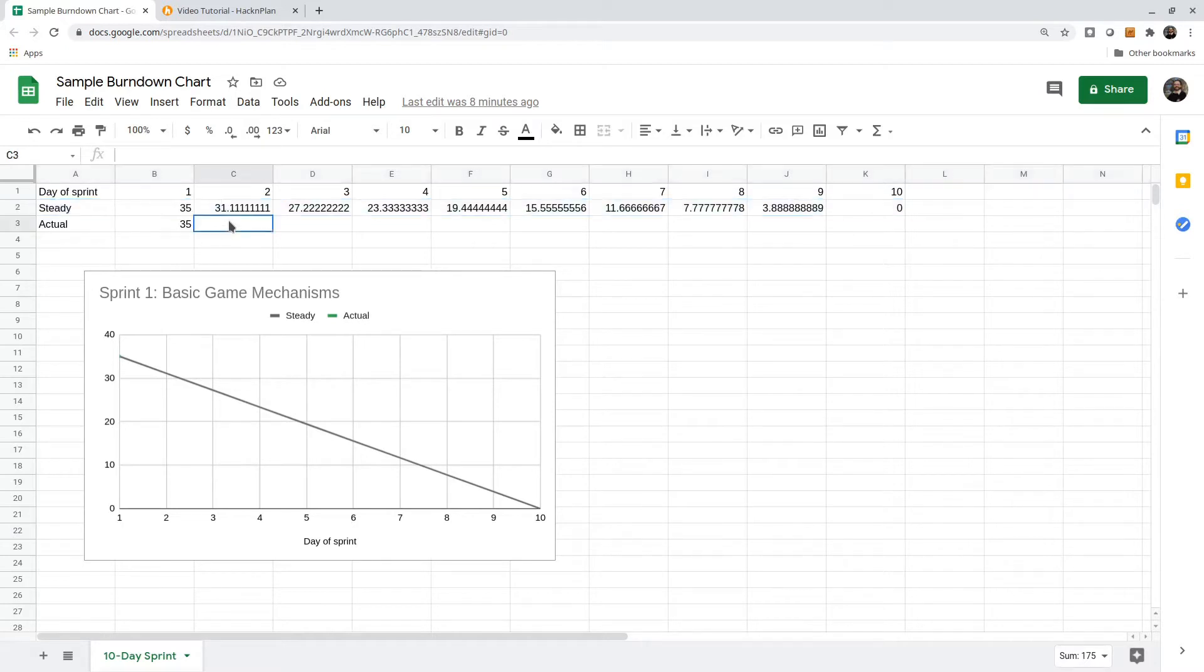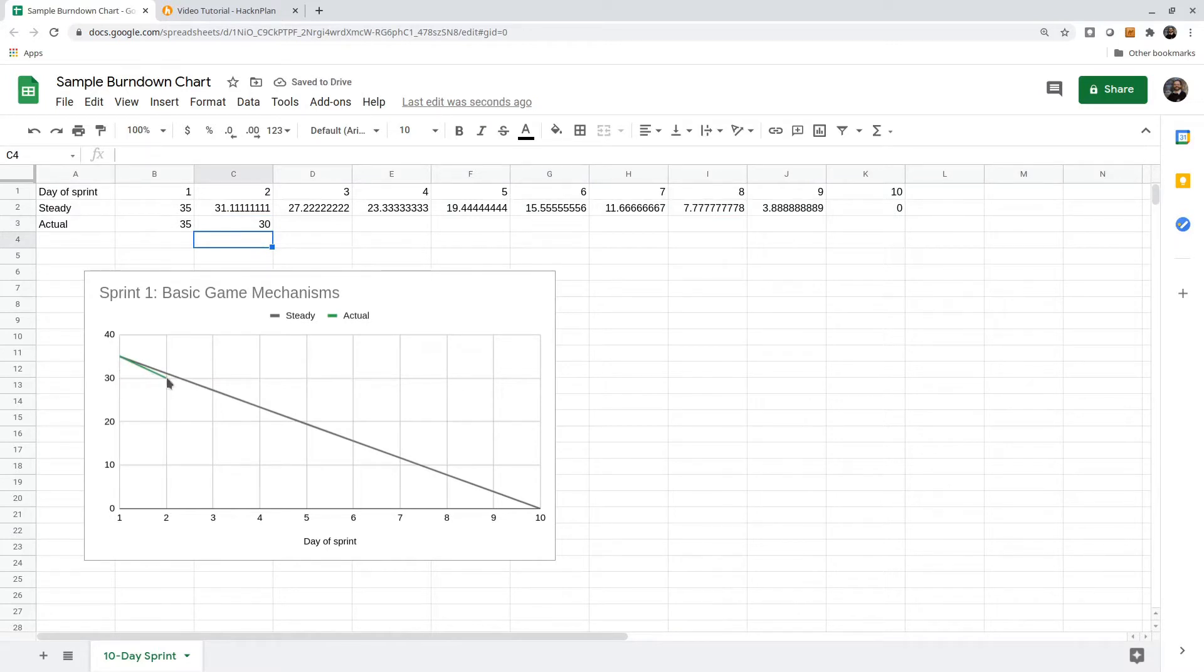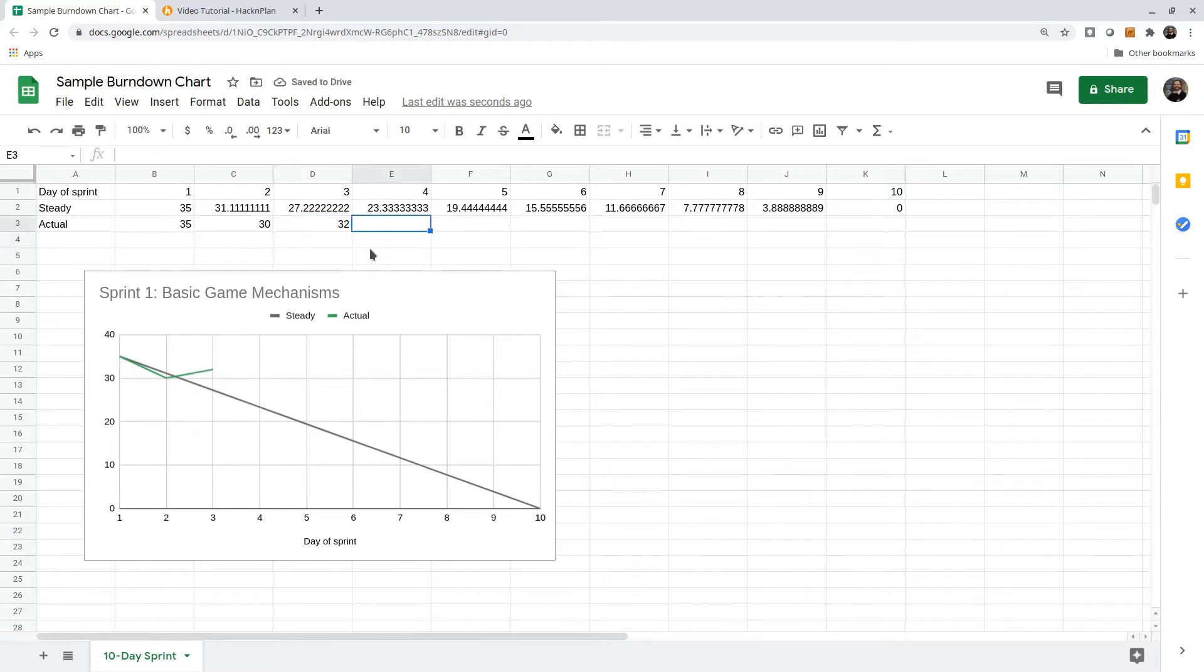Let's say after the first day, we think now there are 30 hours left. We might punch that in here, and we can see that the actual line is shown in green. Maybe the next day we realize some of our estimates were bad, and there's actually 32 hours left, and so on.